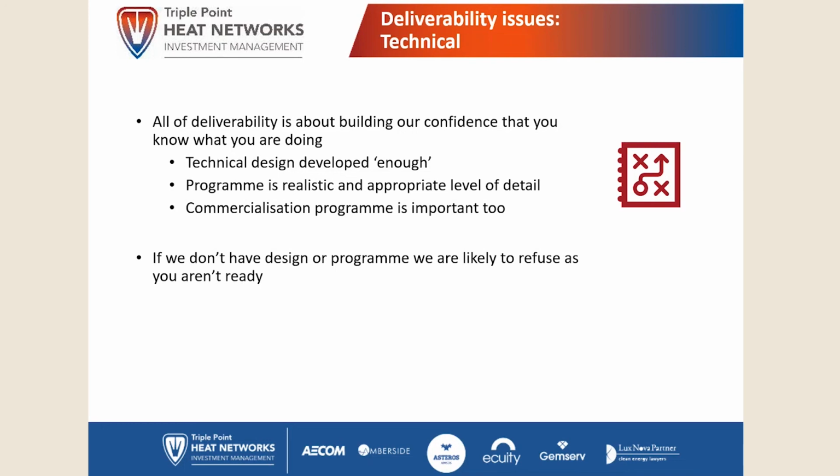If you're in commercialization, the program is less certain in detail, but we would expect you to have identified target construction start dates of the main items and completion dates and heat on, so that we can at least get a flavour of when the construction phase is likely to start and how long it's likely to be, to see whether we think that's realistic.